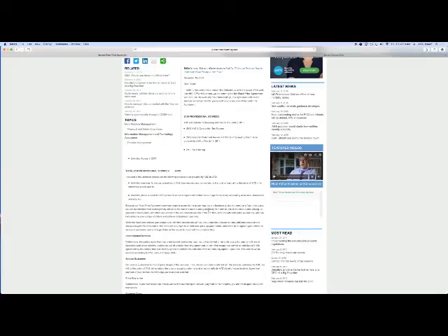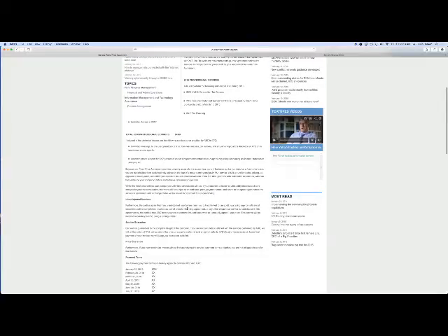It's all inclusive. If there's unanticipated services, this is basically your change order clause that sets up that if something pops up that's not anticipated in this agreement, then that's going to probably be a separate charge, and we'll use a change order. So this is your change order policy. Then you've got the service guarantee. We guarantee our work to your complete delight. If you're not happy, Mr. Customer, only pay for the value that you think you received.